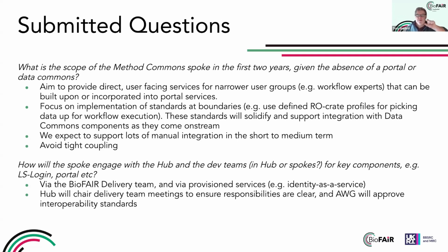You might need to narrow the user group, right? So think about people who are used to coding against APIs or existing workflow experts that know how Galaxy or Nextflow works already, so that they can build upon or incorporate the slightly more fundamental Methods Commons aspects first, and then do that in such a way that they're standardized and can be built upon or incorporated into portal services later.